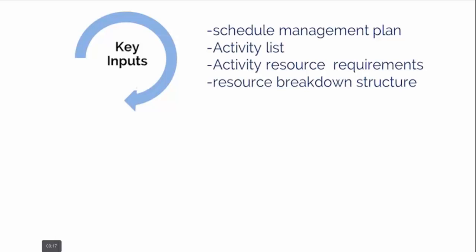For example, if our plan is to assign lower skilled staff to an activity on the project, we may need to extend the duration of that activity due to training requirements as well as the learning curve. Resource breakdown structure. Again, this is a hierarchical structure of the identified resources by resource category. The categories could include labor, materials, equipment, and supplies, and is a useful way to organize and report resource-related data.